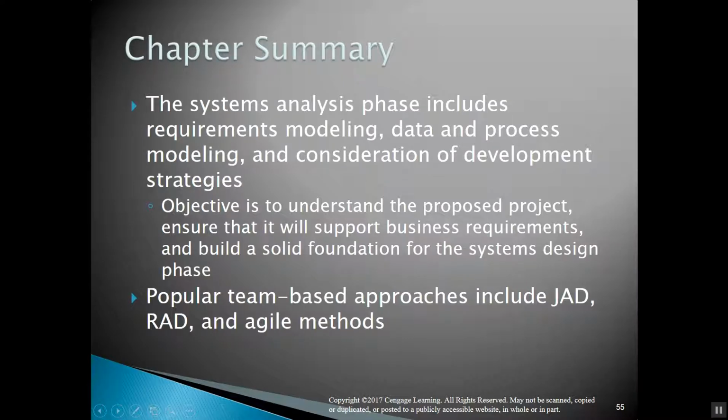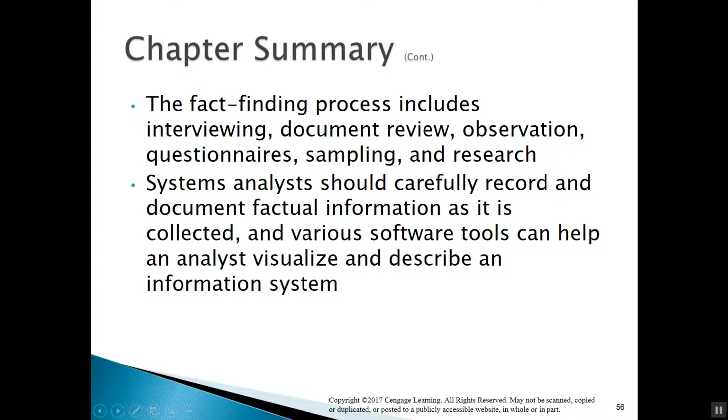So, we're in the systems analysis phase, and here we're analyzing, getting opinions, collecting data to understand the proposed project and ensure that it will support the business requirements and build a foundation for the systems design phase that's coming up next. The fact-finding process could include interviews, documentation, observations, questionnaires, sampling, and research.